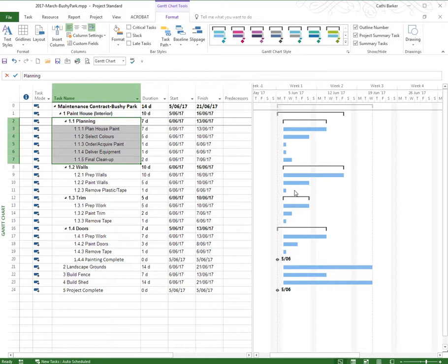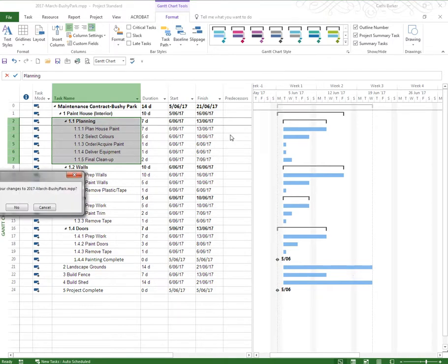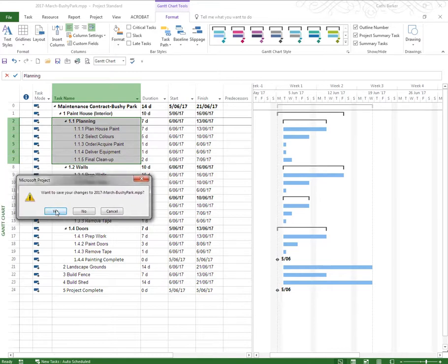Also, the non-working vertical bars here are sitting behind project tasks, or subtasks I should say. What they tend to imply to some readers is that we expect them to work on Sundays because the non-working is behind. It also tends to imply that they have more time than they actually do.